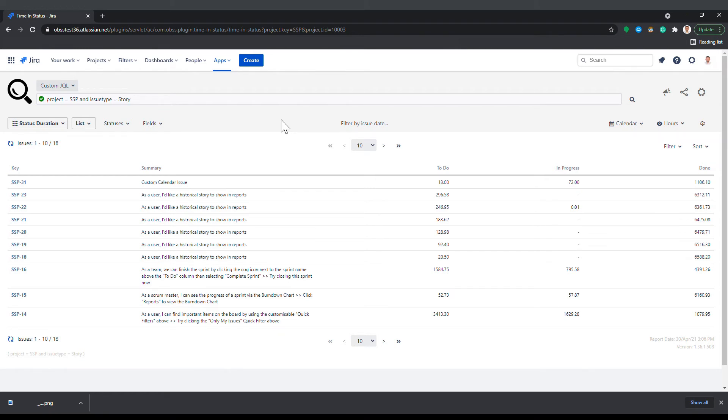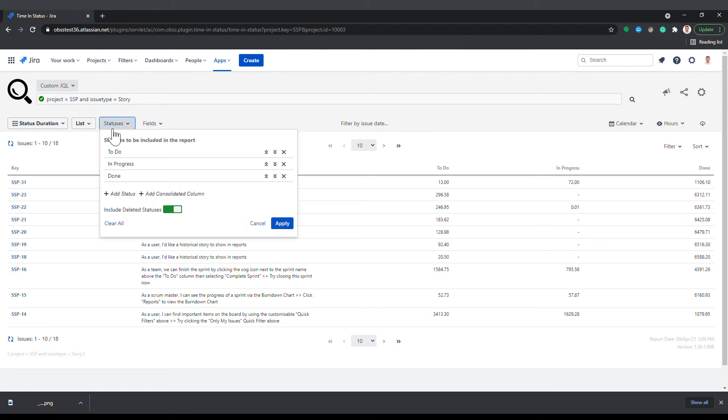For status based reports, you can define consolidated columns. A consolidated column is shown as a single column in the report but contains the total duration of multiple statuses selected under it.